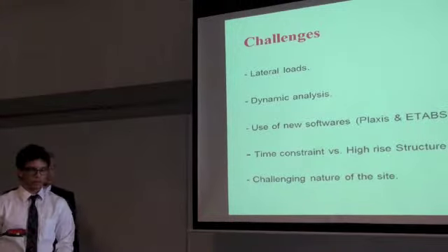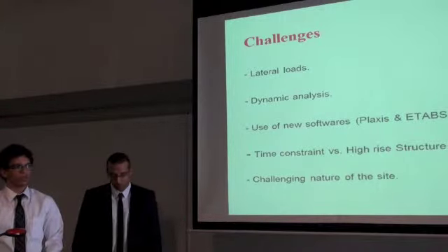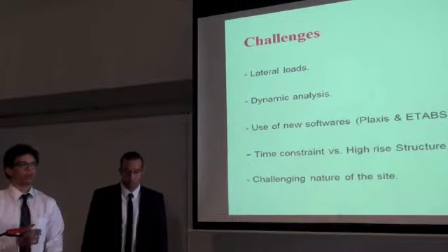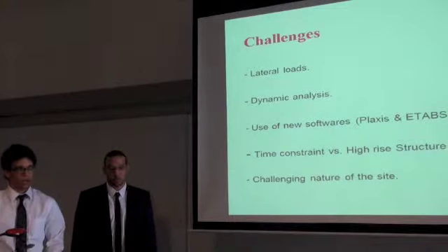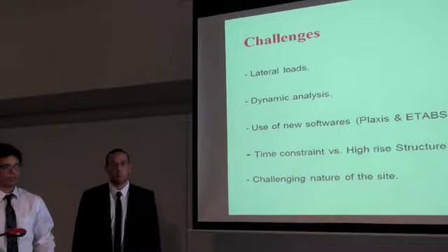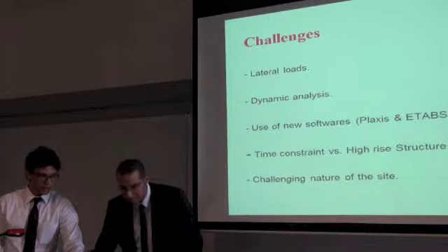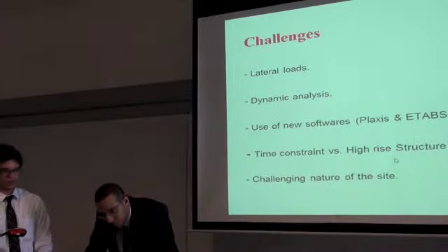Last but not least is the nature of the site. We have to go 3 floors under the ground level. This is approximately 10 meters right in front of the Nile River. So we will have to work with the dewatering problem. And we assume that our neighbors from both sides have deep foundation and basement levels. And we have prepared a video animation to show you the method of construction for the dewatering.